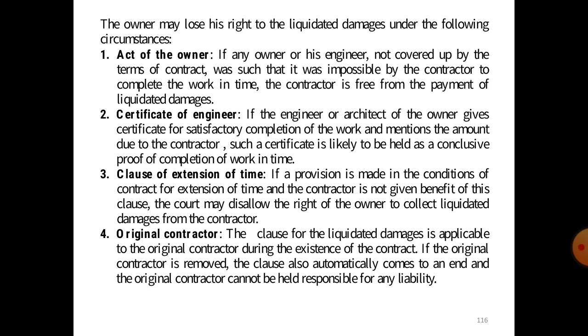So if the engineer or architect of the owner gives the certificate for a satisfactory completion of the work and mentions the amount due to the contractor, such a certificate is held as conclusive proof of the completion of the work in time.